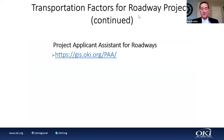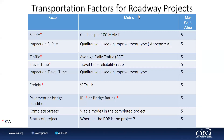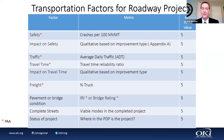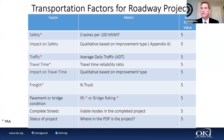Project status refers to the development stage of your project. If you're just starting out, as most applications are, it scores the lowest — zero or two points. But if your project is further along, all plans are done, and you're asking only for construction money, that project would receive a five.